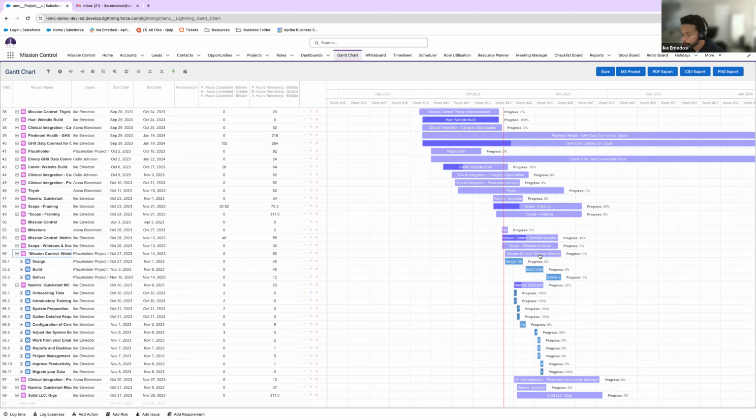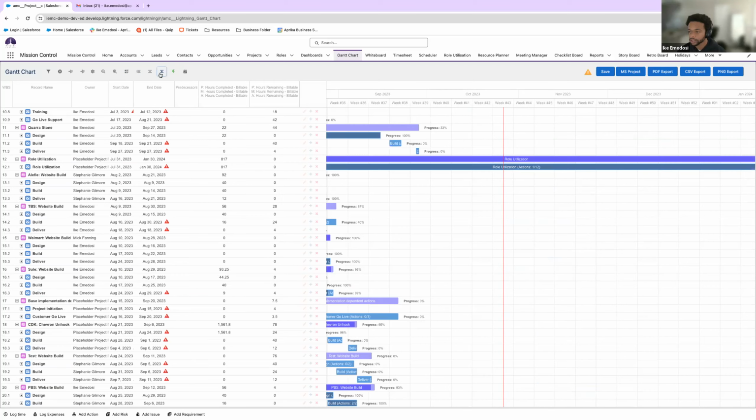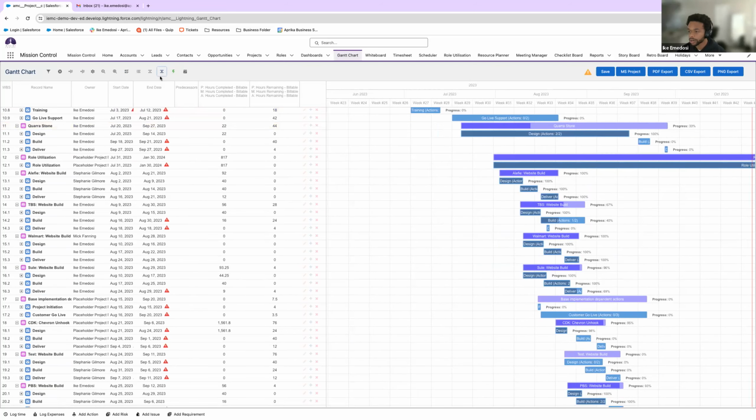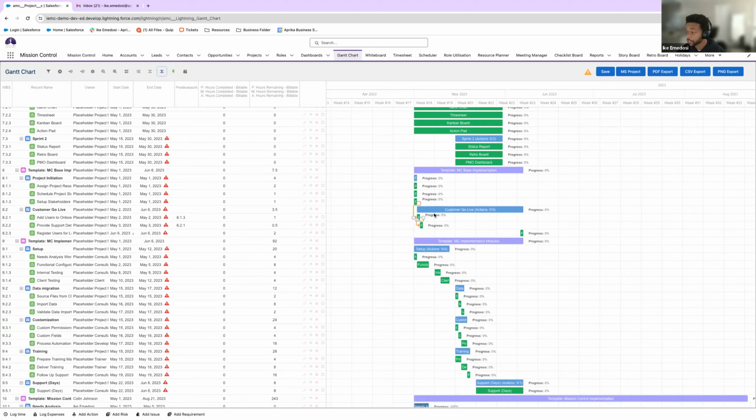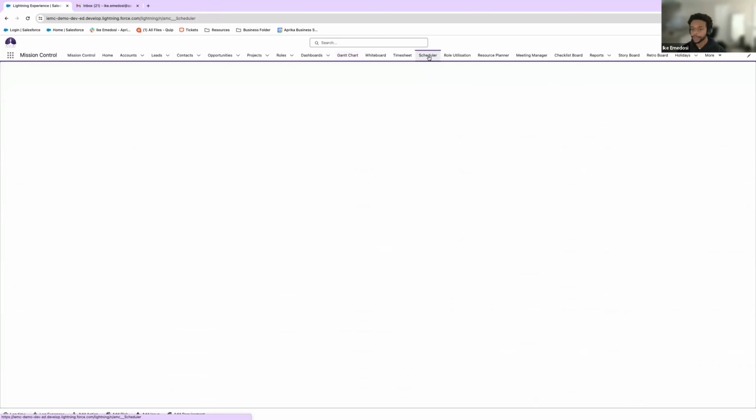And so that's what I'll be doing from the Mission Control webinar to this Namaru quick start. I'll create that cross-project dependency. And then whenever this moves, that moves along with it. And like I mentioned, you can be notified that, hey, it's your time to shine because the preceding task has been completed. So within this Gantt chart, we're seeing all the information of all the projects in real time. And of course, if you want to create cross-project dependencies, you absolutely can.